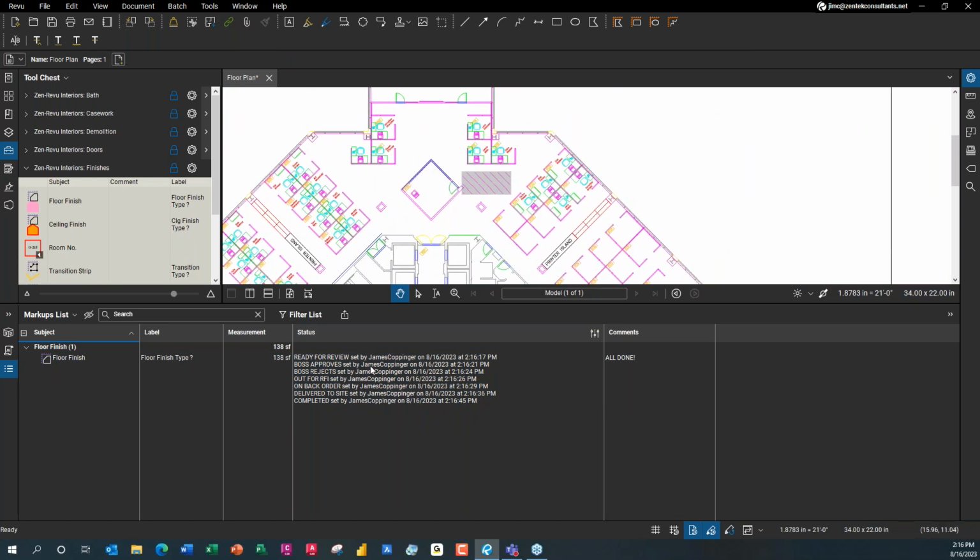With statuses, we have a permanent built-in methodology for ensuring that workflows and communication are being followed for every single item that we mark up within Bluebeam Revu, whether it's an estimate item, count item, doesn't matter. Everything we do, we can track what's happening to it in the real world or within your own personal workflows. Things have to be scheduled for inspection, or if there's any kind of a conflict with them or a punch item or anything else that you have to deal with on your day-to-day operations. That's what statuses do, and I really do believe everybody should build their own custom statuses and be working with this on a daily basis.